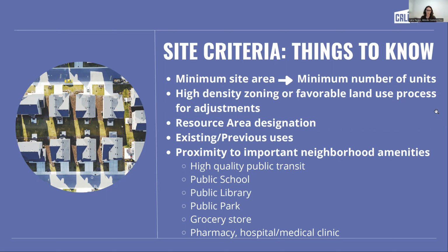Things you have to think about as you're doing that analysis, and we won't get into the nitty-gritty of that analysis here, but in general, you've got a total site area, but then you need to start to shrink it a little bit once you understand: are there setback requirements? Is there something unusual on one corner or one part of the site that you won't be able to build on easily? Or is it a strange shape?